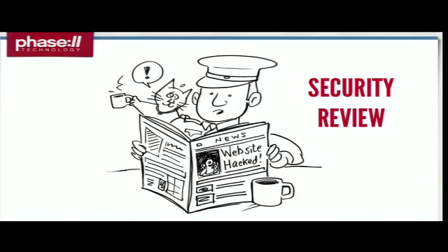It's incredibly important that you use outside people to independently verify your assumptions around security. I cannot stress enough the need to understand how to write secure code, and moreover, to have somebody else who is not a part of your team tell you that, yes, that code is secure. It's a really critical piece of making sure that you have a successful site launch.